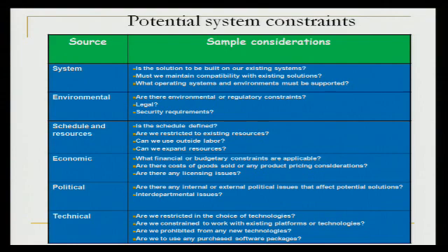Okay, so then you root cause it. So identify the problem, root cause it, Pareto rank it, because we probably won't be able to solve all aspects of the problem because of constraints like this. I'll talk about this in a second. So you have to Pareto rank it and solve the biggest parts of the problem first. We talked about identifying stakeholders. There's direct and indirect stakeholders. Draw the system boundary. And then step 5 was really this one, identify system constraints.